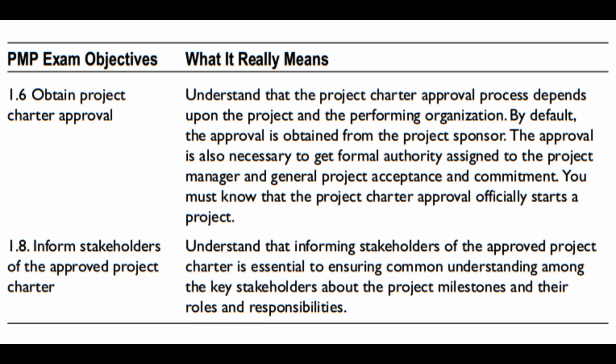The approval is also necessary to get formal authority assigned to the project manager and general project acceptance and commitment. You must know that the project charter approval officially starts a project.